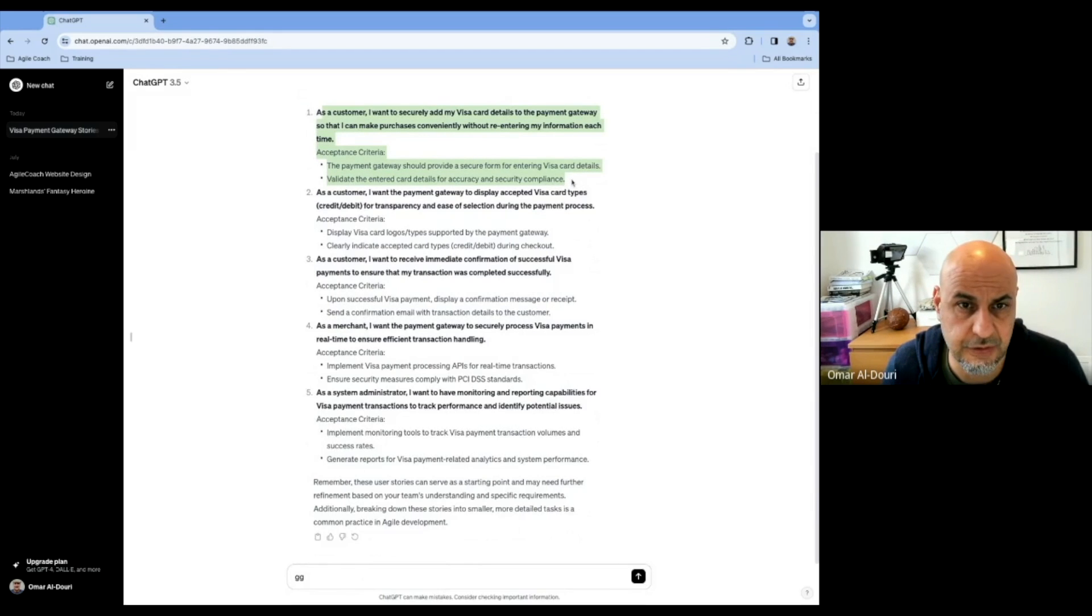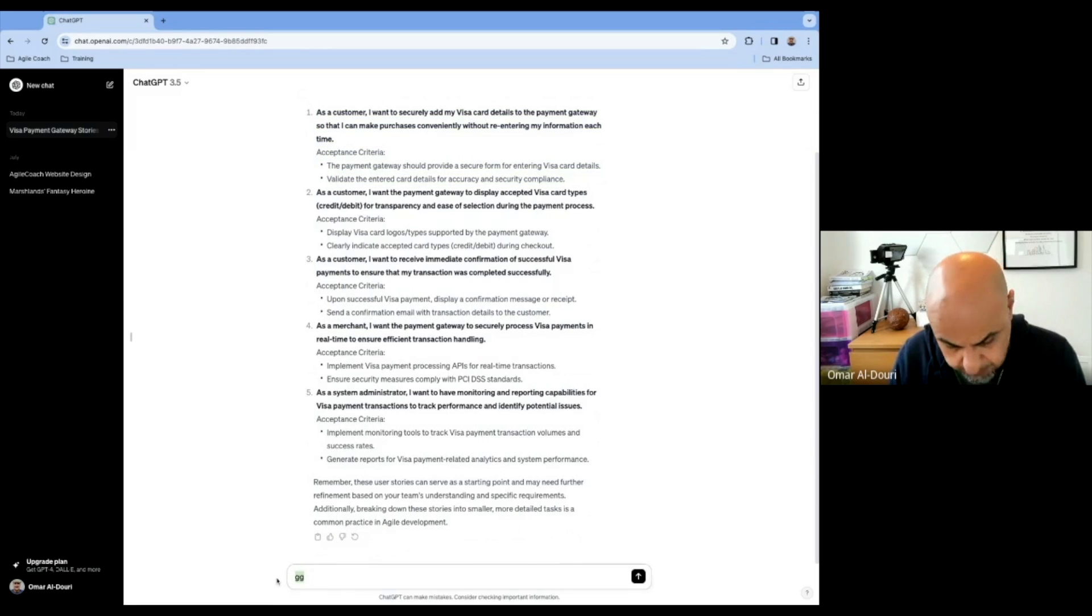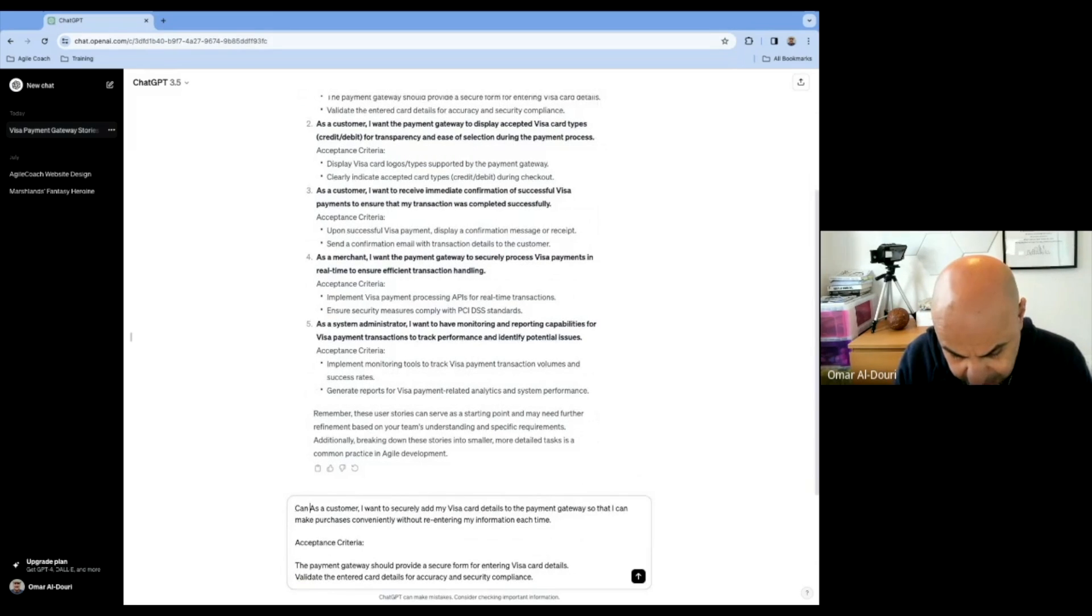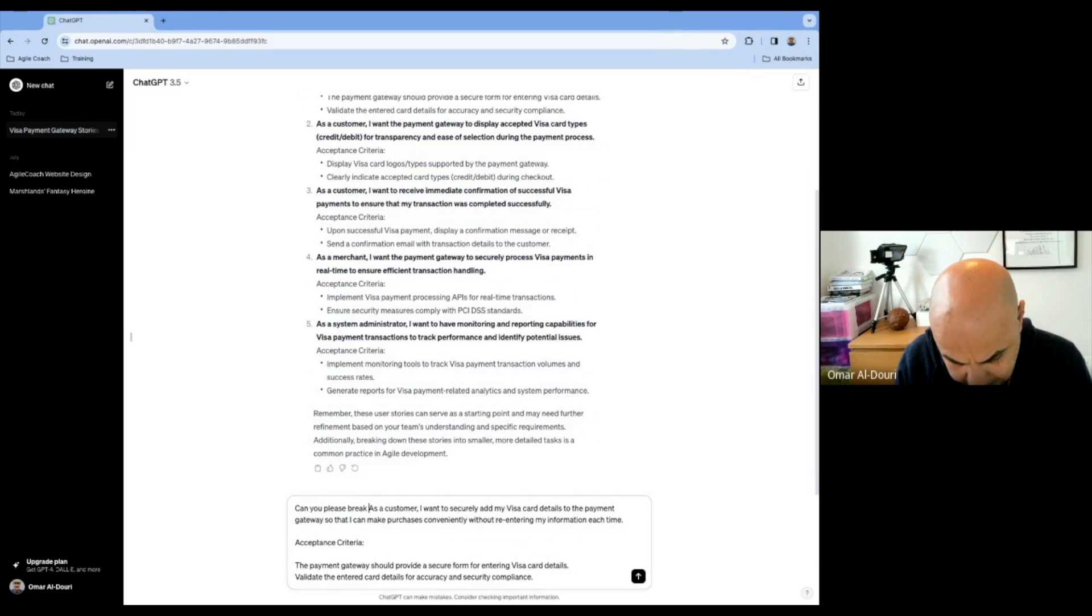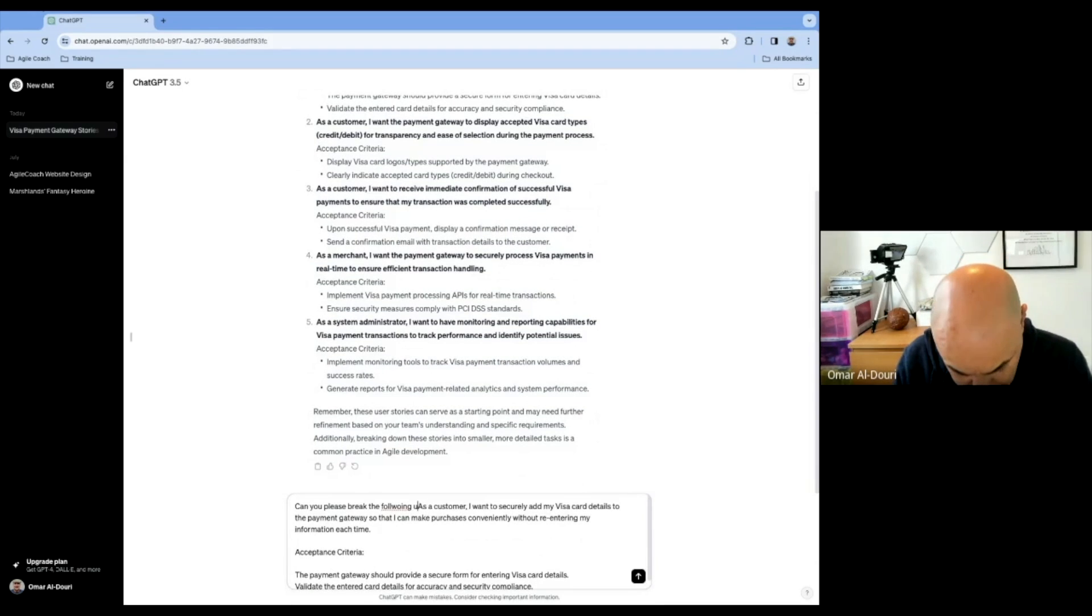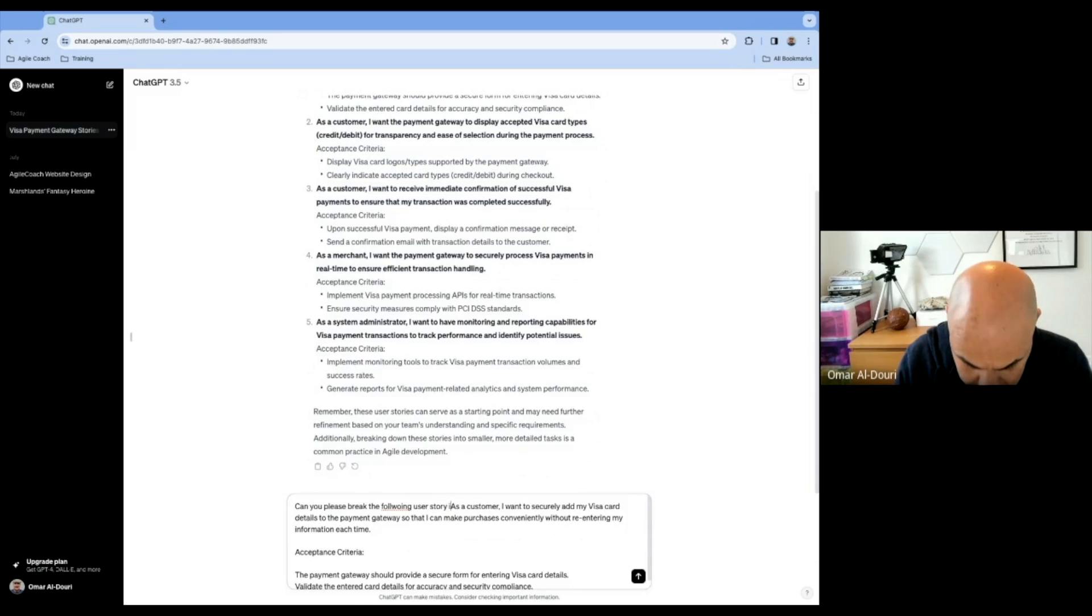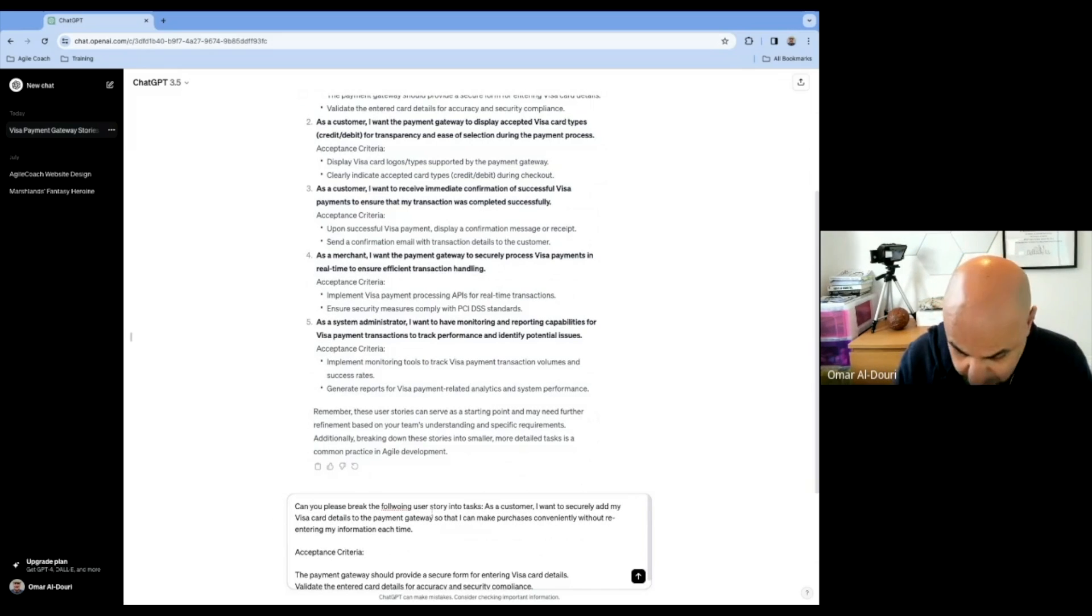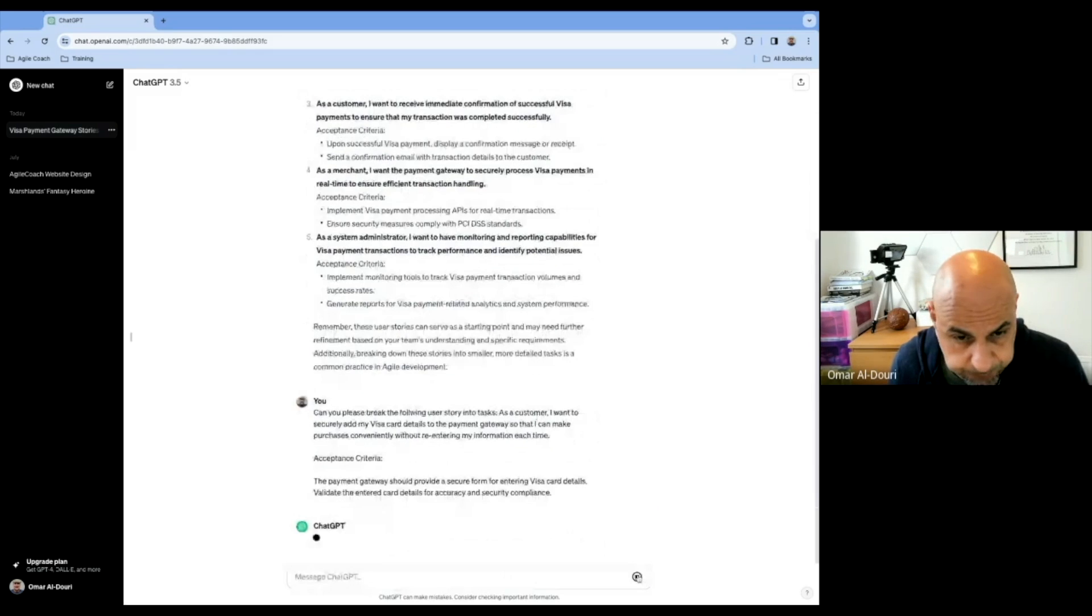But I just want to also show you that, for example, for the first user story, I'm going to copy that, put it in the bottom here and ask it, can you please break the following user story into tasks? There we go. I'll just correct that and say, go.